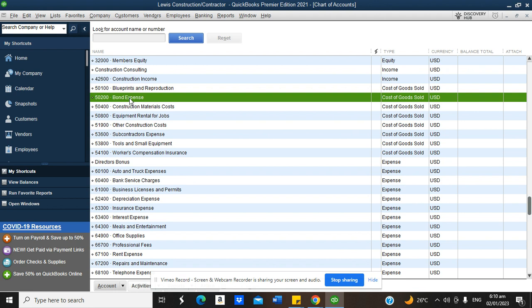So, what is bond expenses? Sometimes when you win a construction project, the clients will require you to tender or be able to get the money from the bank. Now, what that means is that they will only give you a certificate or a document to prove that you have a project with them, but you will be required to source for the money to start the project. And then maybe if the project is at a certain stage, then they will require you to send in your invoice. So because the project is huge, some construction companies will have to go to the bank to request a loan. So they call that APG, advanced payment guarantee. In some companies, in some other regions, they call it bond.